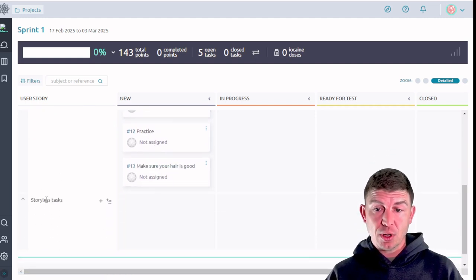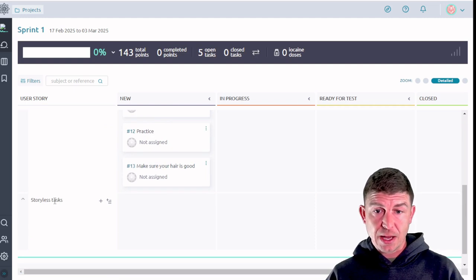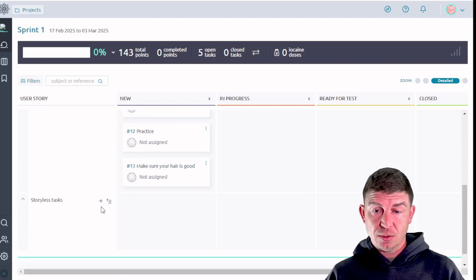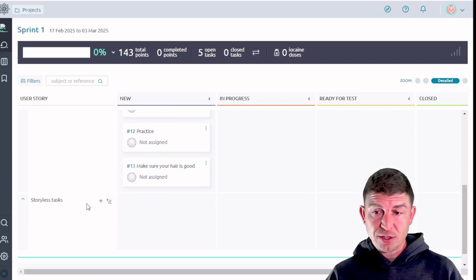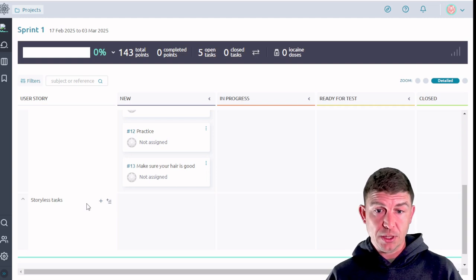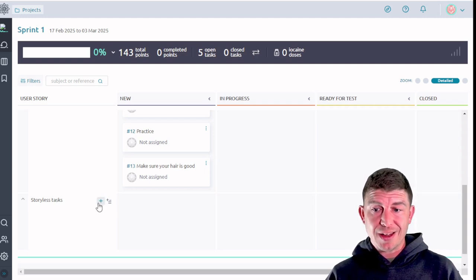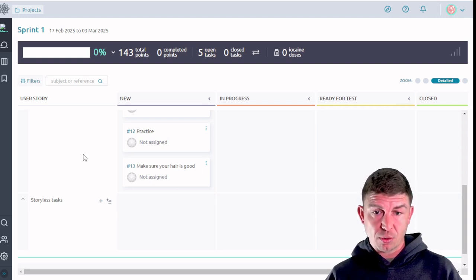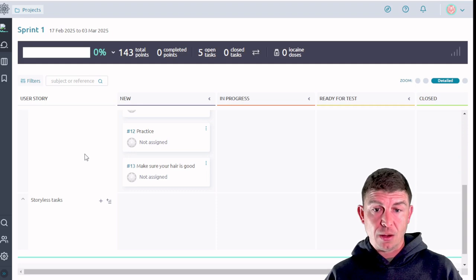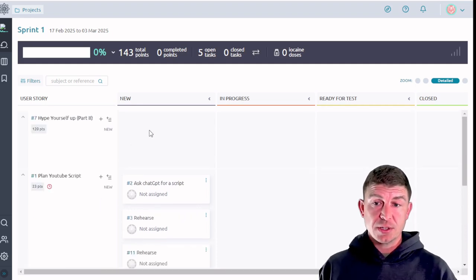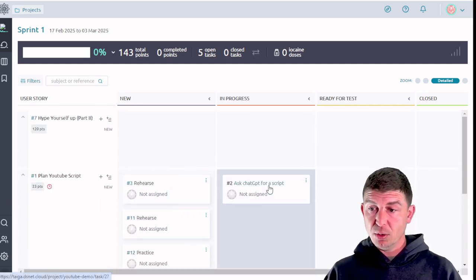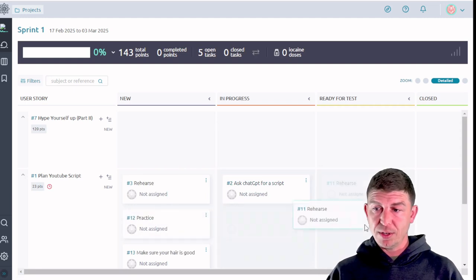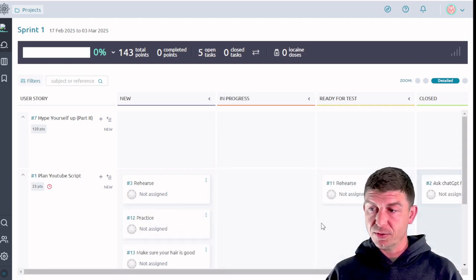It has on the left hand side each of the user stories. And if any of those user stories had subordinate tasks as this one did, we're going to see all of those subordinate tasks listed. You can also add story list tasks. So these are tasks that are required to be done for the sprint to complete, but they're not necessarily a part of the user story.